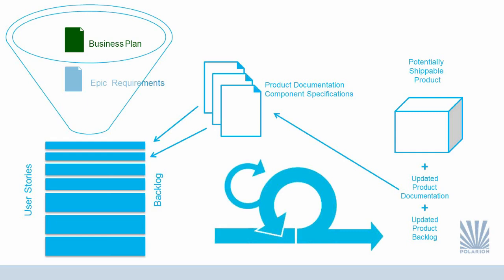The user stories in the backlog are prepared to different scopes. On the bottom I have big, roughly written stories. On the top of the backlog, there are well-formulated, small enough, and estimatable stories, just ready to be planned for the sprint. The component specifications provide supplementary documentation for user stories to ensure product consistency.